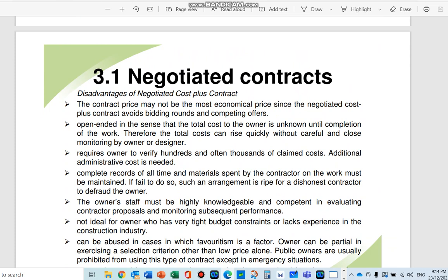So this will usually be some form of negotiated contract. With this sort of method for contracting, you will match a certain tendering method, and normally this will match a negotiated kind of quotation or proposal based on project data, compared to just lump sum or the traditional procurement strategy where the design is pretty much complete. So you can do this for complete designs as well, but